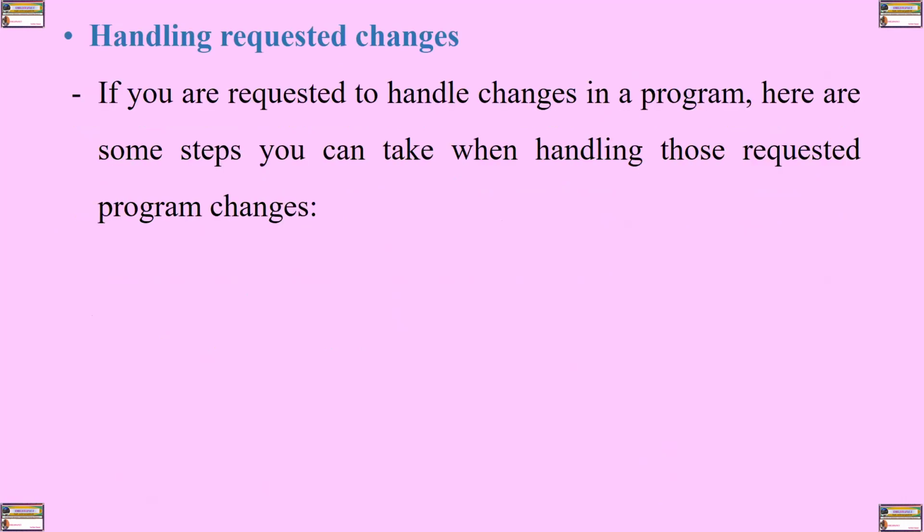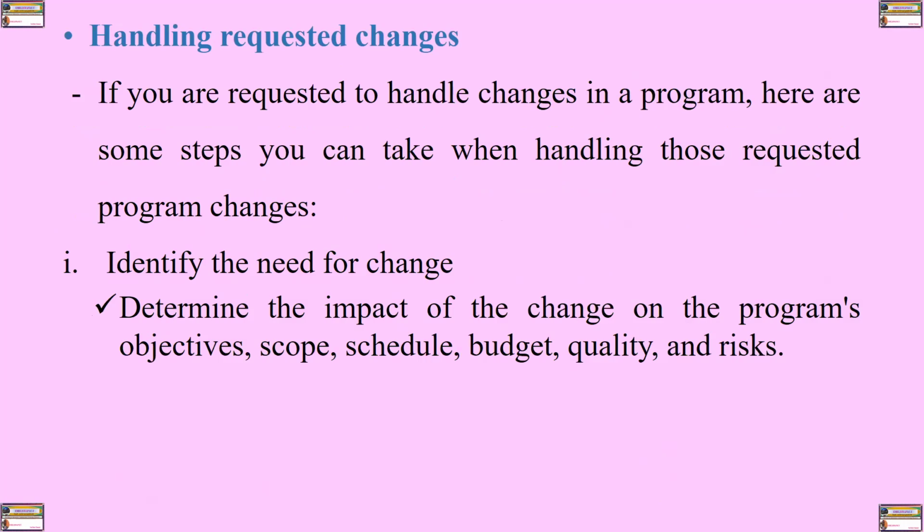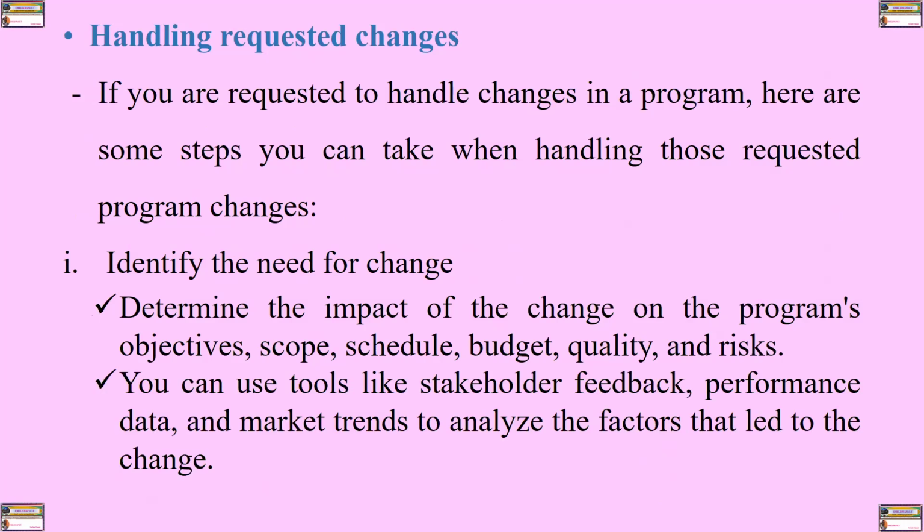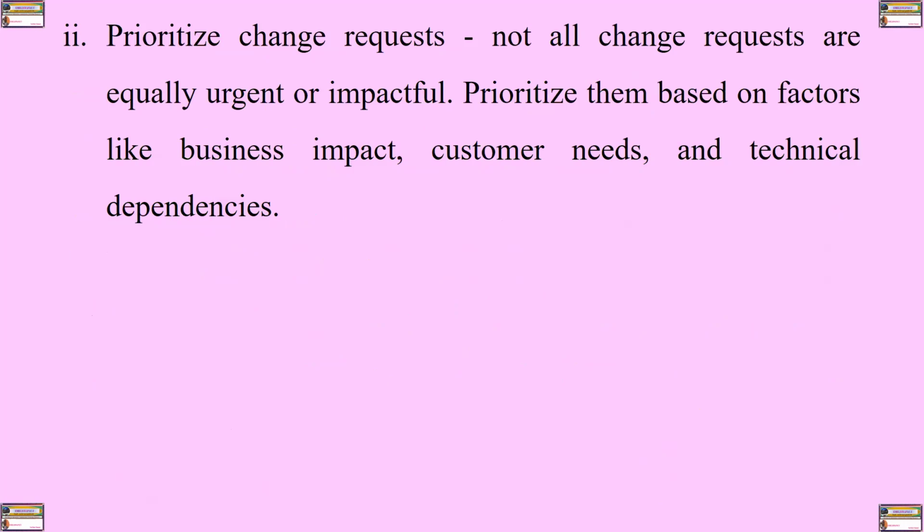So how do you handle the requested changes? If you are requested to handle changes in a program, here are some steps that you can take when handling those requested changes. Number one is to identify the need for the change. Determine the impact of the change on the program's objectives, scope, schedule, budget, quality, and risks. You can also use tools like stakeholder feedback, performance data, and market trends to analyze the factors that lead to the change.